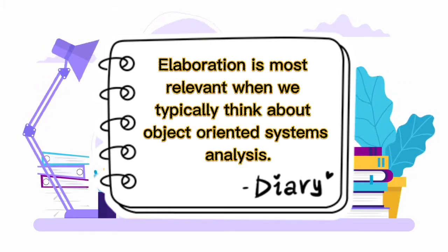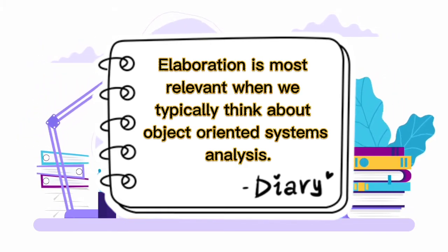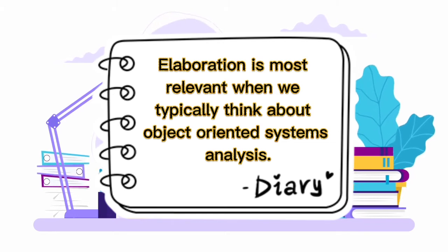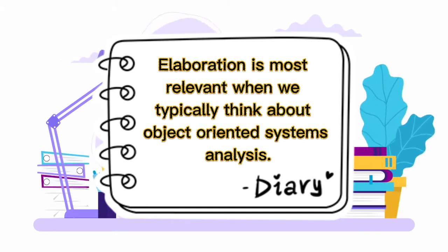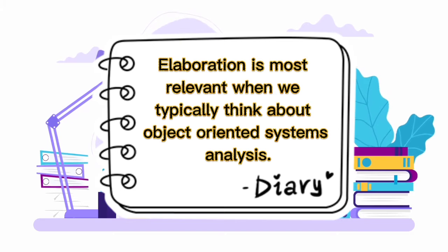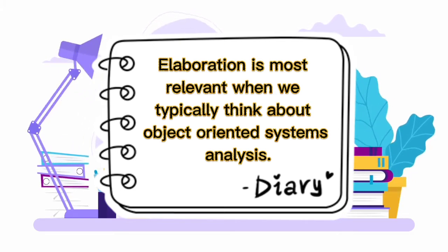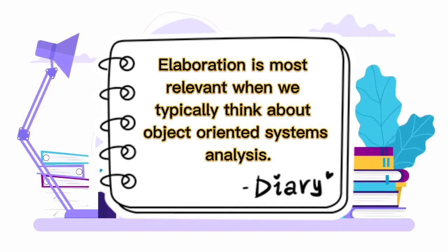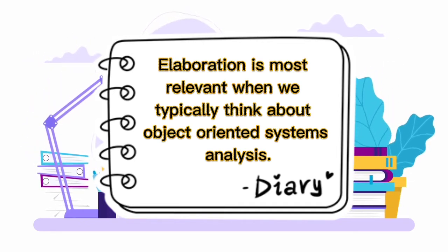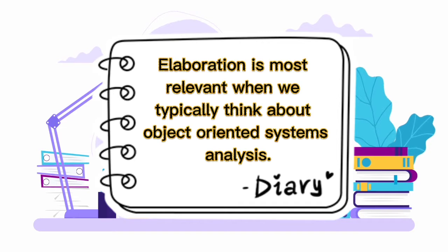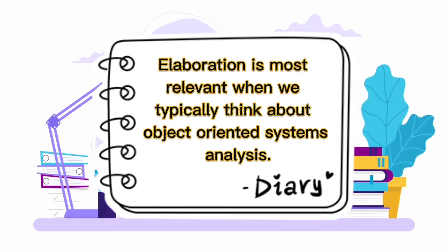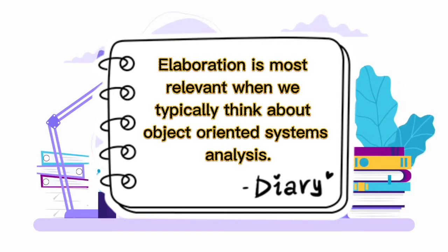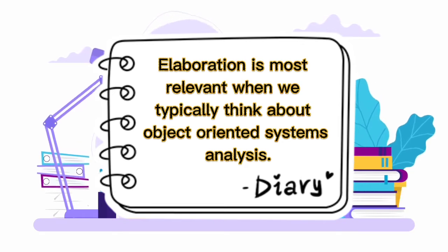The elaboration phase continues with developing the vision document, including finalizing the business case, revising the risk assessment, and completing the project plan in sufficient detail to allow the stakeholders to be able to agree with constructing the actual final system.